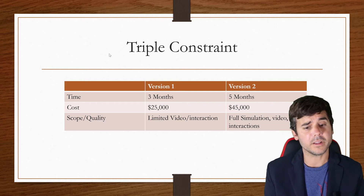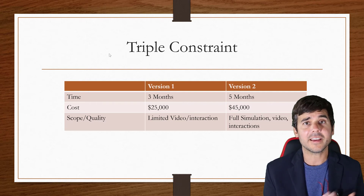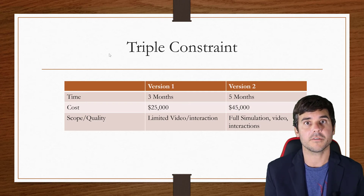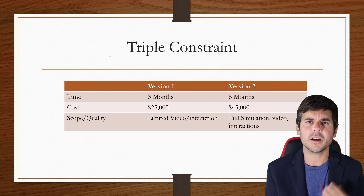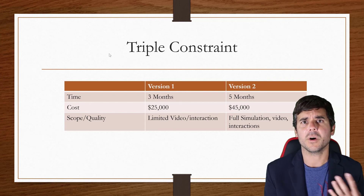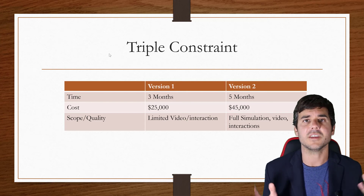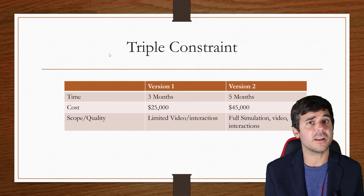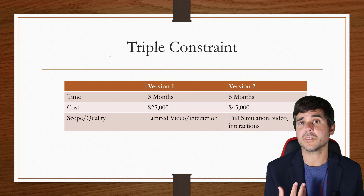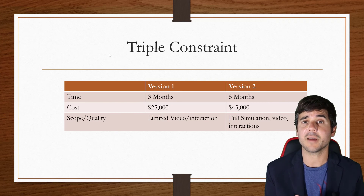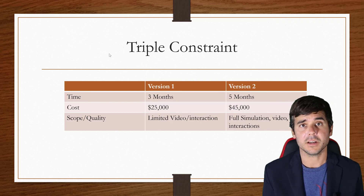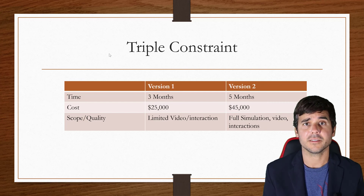As I'm talking with the client, I try to give them rough estimates off the top of my head during that 30-minute conversation — roughly what I think it's going to cost, give or take 15% or so, so they have some rough ideas. Then I present them the options. I like the options because it gives the client time to really think about what they want and what's really going to meet their needs. And that's the triple constraint.